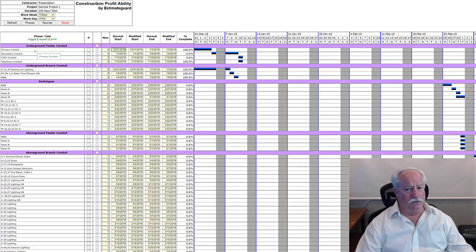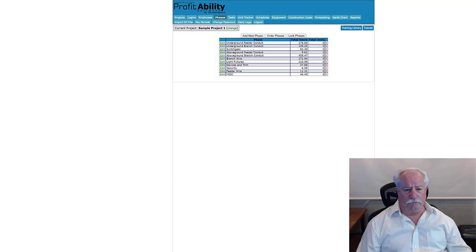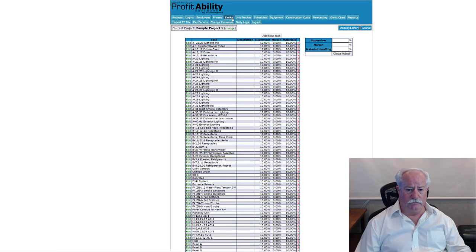But it forces you to look at each phase of construction and consider what items you're going to need there. And then you have a good record of it so that you can track those items and check them off prior to starting that series of tasks, okay? So let me show you how to do that, and we're going to switch pages here. And we're going to create some tasks.